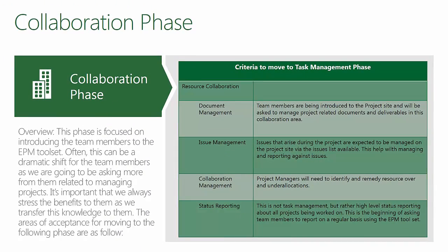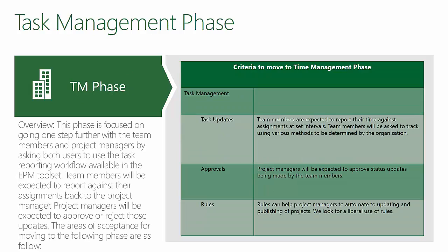From the collaboration phase, we look at task management. Here, we want to allow team members to start tracking their updates. Project managers will be expected to publish, get their assignments into the hands of their team members so that team members can report progress. We're approving those updates and making sure that they go into the schedule.